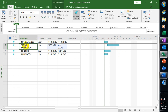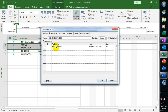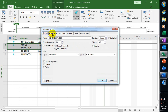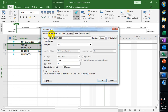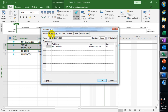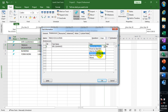Let me double-click on Trench Excavation. You can see from here we have tabs: General, Predecessor, Resource, and Advanced. We are focusing on Predecessor and Successor today. Under Predecessor, I can see that for task number 2, Site Clearance is my predecessor. You can see the dependency type — there is a dropdown: Finish to Start, Start to Start, Finish to Finish, Start to Finish.